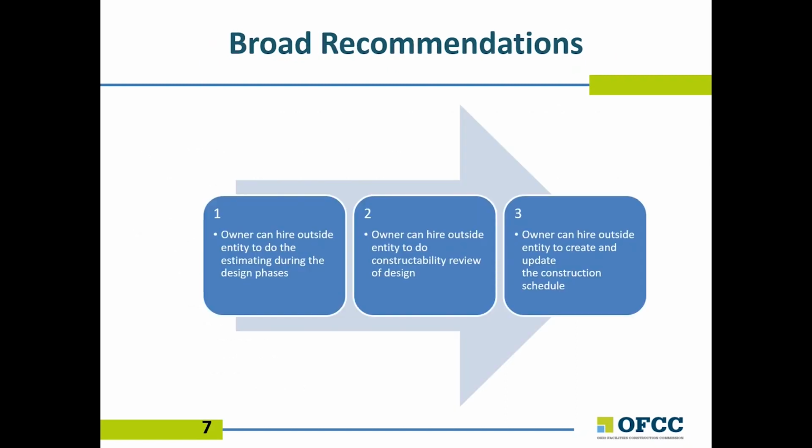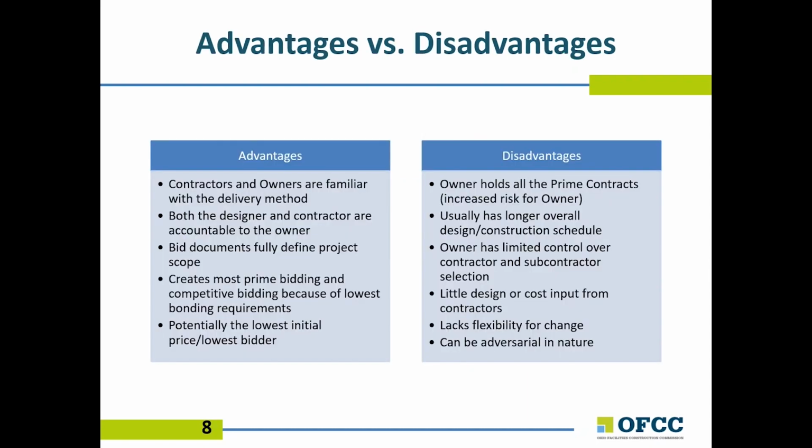Some broad recommendations to consider when using multiple prime include the use of independent cost estimating and constructability reviews of the design documents during the pre-construction phase. In addition, the owner is advised to seek scheduling coordination assistance during the construction phase. We will now cover the advantages and disadvantages of multiple prime delivery method.